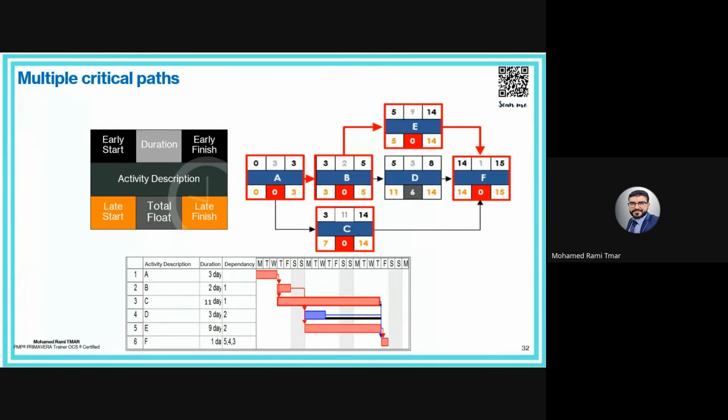So now let's pretend something. Let's imagine a delay is happening in path A. So path A is delayed by 3 days. The path A, which is the critical path, the longest path, is delayed by 3 days. So A becomes 23 days. We have a negative float of 3, -3. Okay? And the path B is still 18 days.